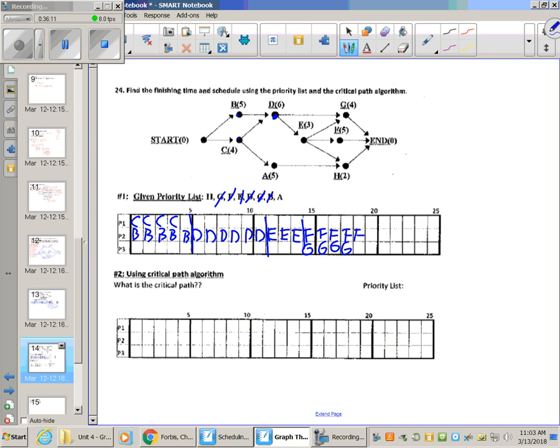So now, can I do H? Well, E and A have to be completed. I haven't done A yet. Let's do A. Well, if I go to A, okay, A's only prereq is C. So let's put A somewhere where it doesn't overlap with C. Which, honestly, I can either put with P1 or P3 down past the point of 4. Let's just give it a P3. How about 5 A's right here?